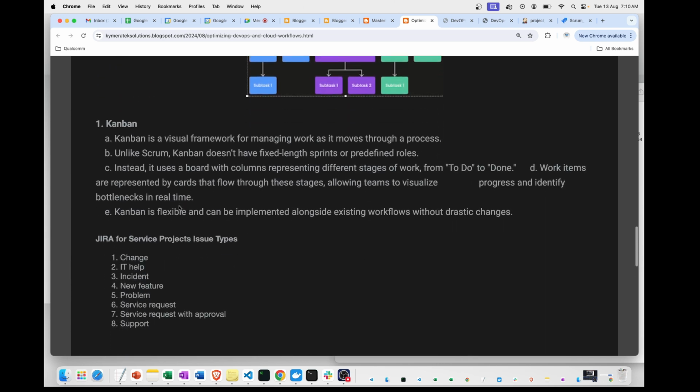So coming to kanban. Kanban is a model used where your project is completely finished, or the proper development has been completed, and it is in the maintenance mode. It means you just have to maintain, and no bigger new features are coming.